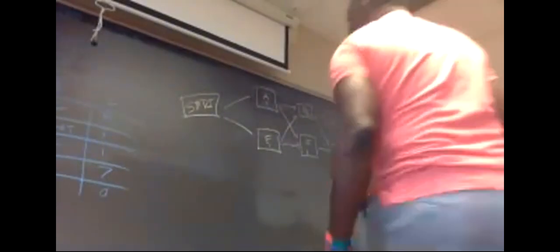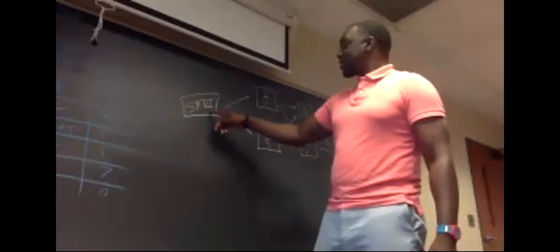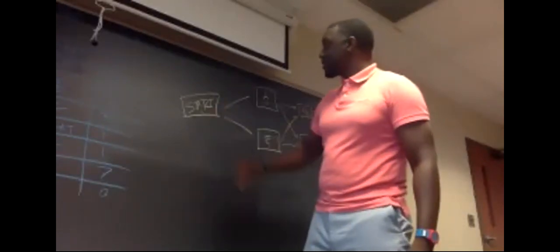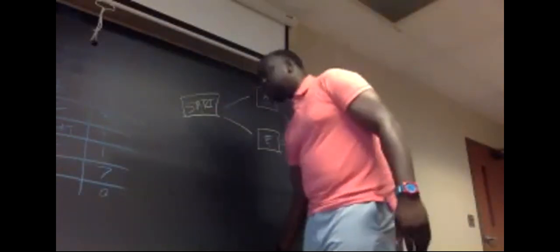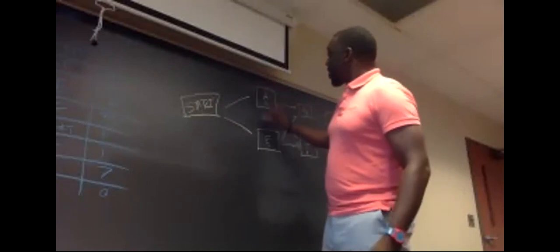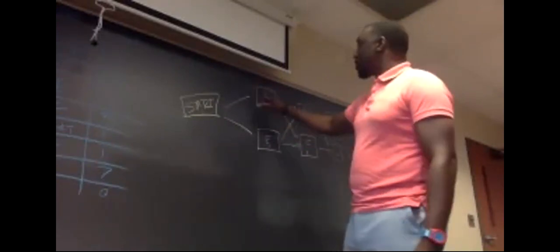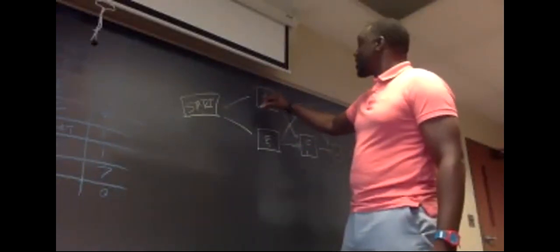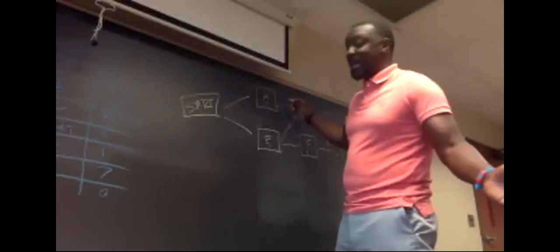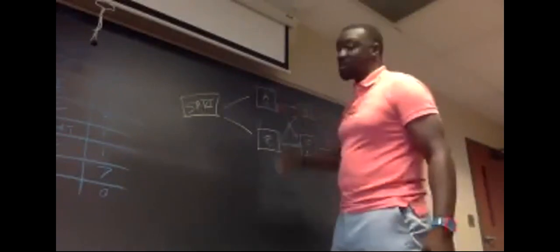Now let's calculate this puppy. So we know start has a duration of 0 always. Let me do something that stands out. I'm going to go with green on the numbers. So let's calculate one path first. We start with 0 at the top left of A. 0 plus 6. All we're doing is adding at this point. 0 plus 6 is 6.